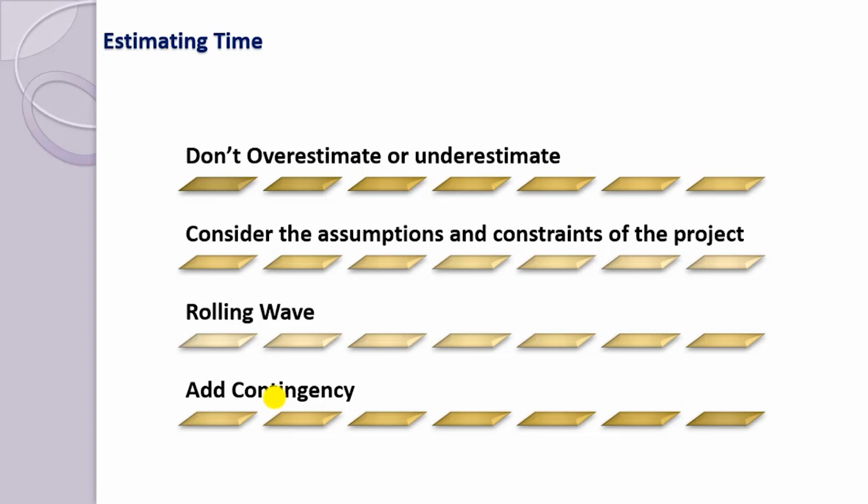In certain cases, contingency gets used up on almost every project, when people tend to deliver a piece of work when it's due, allowing the work to expand to fill the available time rather than trying to meet the original deadline and preserve the contingency.